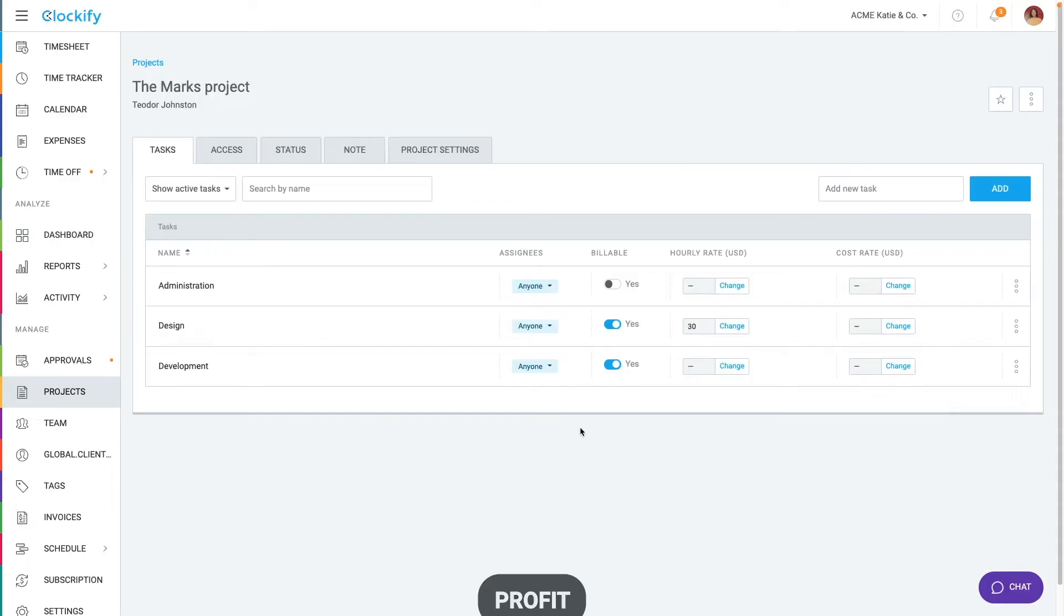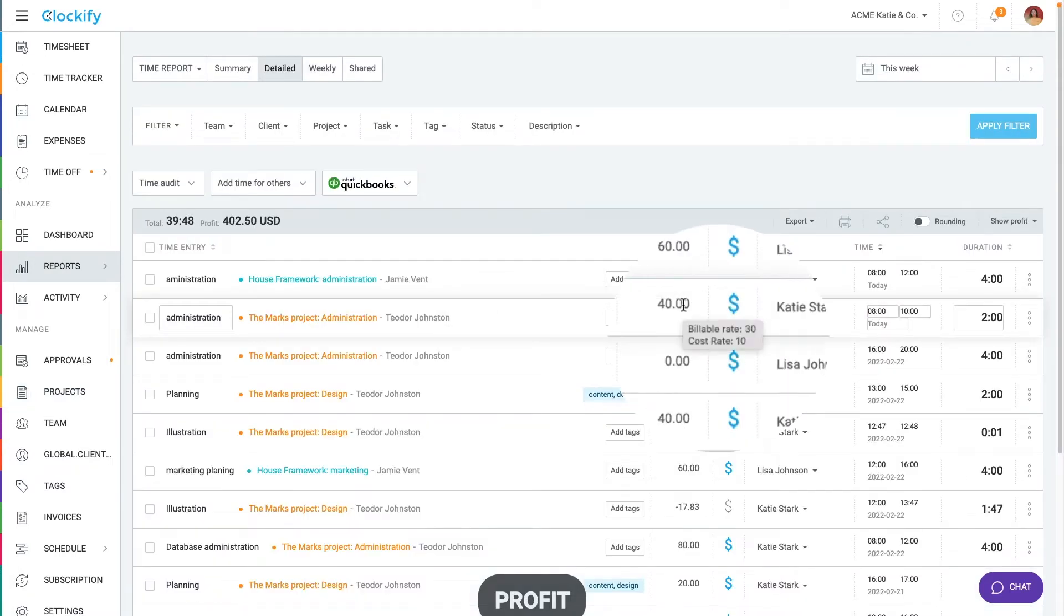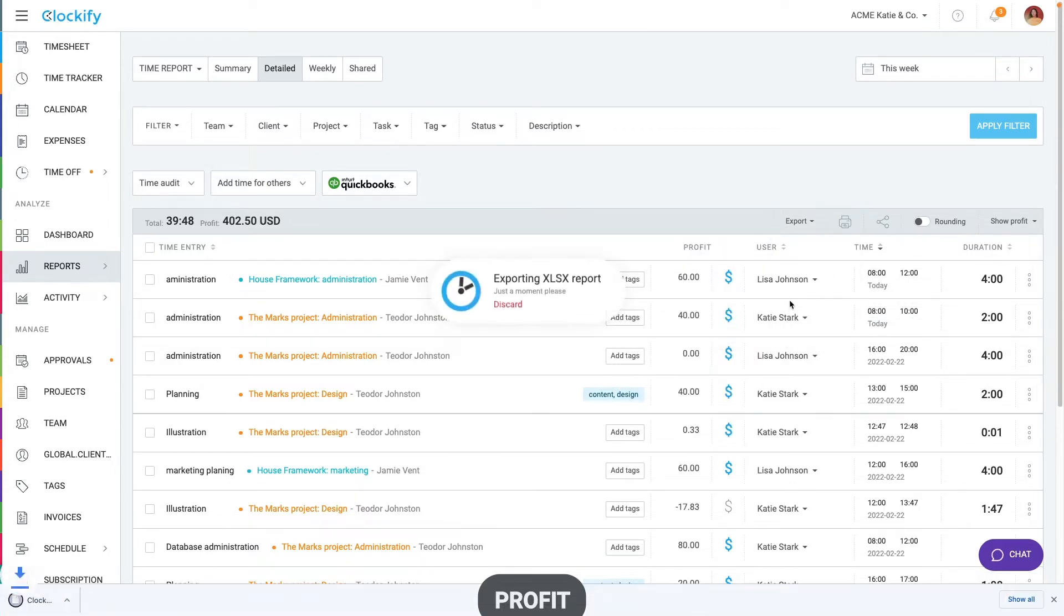If you wish to know which billable or cost rate an entry picked up, go to detailed report and hover over its amount and a tooltip will show you its rate. You can also see this if you export detailed report in Excel.